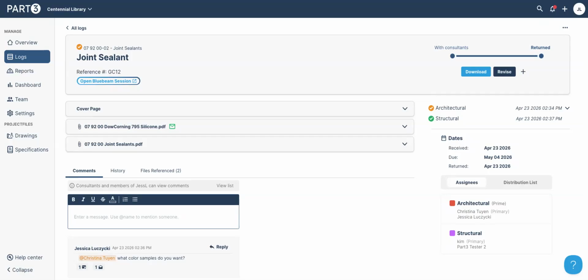All this means is that if you had a submittal that you wanted the consultants to review one at a time, you could do that. For example, if you got a rooftop unit and you wanted mechanical to review first before electrical and then yourselves, you could set up that flow. In this one that I've just showed you, anyone can review it at any time.